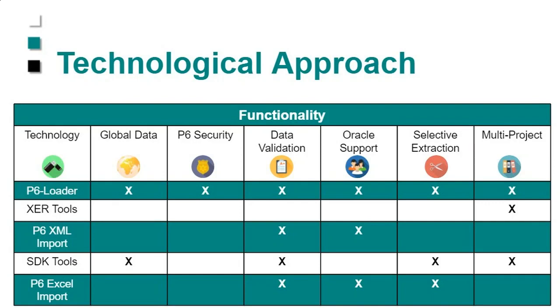And when they imported it, P6 imported it, everything worked fine, except that next time someone tried to log in, the system crashed. And it didn't give any kind of message, it just shut down. And we had to go and figure out what the problem was. It took us about a day to figure out what had happened. Well, what happens is when you load P6, it reads the activity code dictionary. It's one of the first things it does. It found this value it didn't know what to do with, and it just shut down. So very risky to be manipulating XCRs.